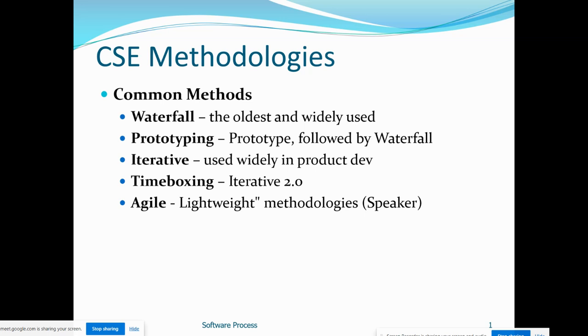Iterative, the process will continue. Whenever user requirements are not changing, I can go for the waterfall model. If I don't find any unstable requirements. But if, for example, day by day the user requirements are going to change, or monthly some user requirements change, or clients are giving more requirements depending upon the market trend, then in those cases the waterfall model cannot be used. We can go for the iterative or incremental model, or I can go for my agile model.